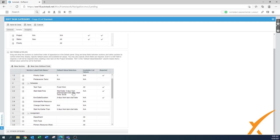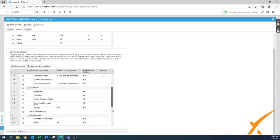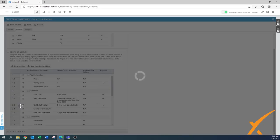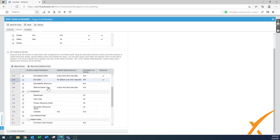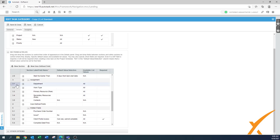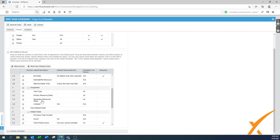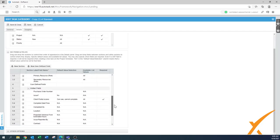In the schedule section: task type fixed work — leave it in. Start date, end date, and estimate — definitely visible; you can make estimate a required field. Change order hours — move that to the end since we don't use change orders. Start time, end time, and duration are good to have. Department — if you don't use it much, you can leave it out. Work type and primary resource role — yes, keep those visible. Secondary resource roles — also good to have. Contacts — not applicable for tasks, so hide that.